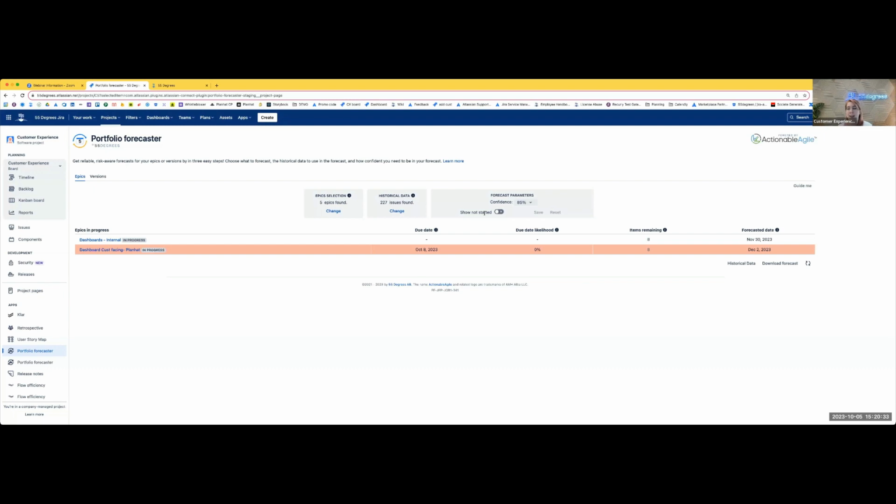And let's say you want a 95% confidence level, and you are told, okay, this one will be done by November 30th. It's November 30th or before. So it doesn't mean you won't achieve it before that. It's just what we think is the last date possible for now.